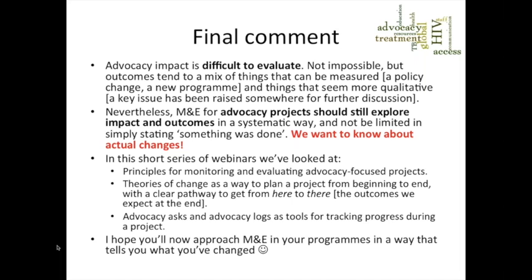But regardless, M&E for advocacy projects should still be systematic, and we shouldn't be limited to just saying we did something, we ran a workshop. We want to know about actual changes. So what was the impact of that workshop? What was happening 3 months after the workshop, for example? We did this training with the police about harm reduction. Okay, we did the training, 20 police officers attended. So what's been the impact 3 months down the line? Has there been a difference in the way that the police interact, if it's harm reduction, for example?